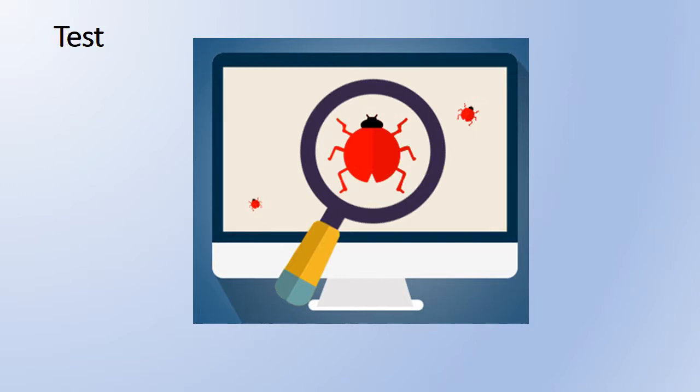Once the code is written, we need to test it. The testing consists of both integration and system testing. The testing column may or may not have a done column, depending on how the software is delivered. If it's delivered continuously, then there's no need for a done column. If it's delivered in installments, such as weekly or monthly releases, then a done column will tell us what needs to be implemented on the customer's system yet.